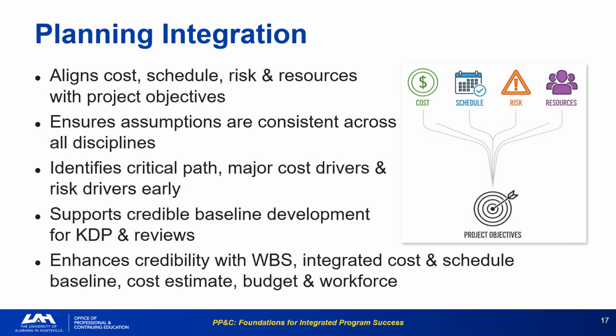Integration is essential during the early planning phase. Integration aligns cost, schedule, risk, and resources, ensuring consistent assumptions across all disciplines. Early integration helps identify the critical path, major cost drivers, and risk drivers before the baseline is approved. A successfully integrated planning phase results in a credible baseline that enhances confidence for major program reviews.